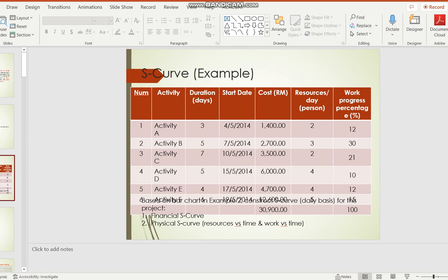You see, this contract will have these different major activities that will line up with the summary of tender normally. You will line up all the major activities, inclusive of all the BQs under each major activity, and you will have a subtotal for that particular activity. So you just take it out, write it down, and then create a table like this. Then, of course, you have to take note of the days or the duration of work. Let's ignore this bit first, because this is going to be on physical S-curve, okay?